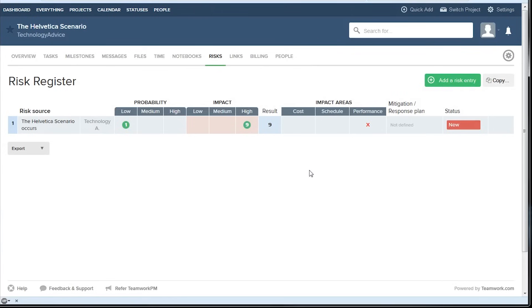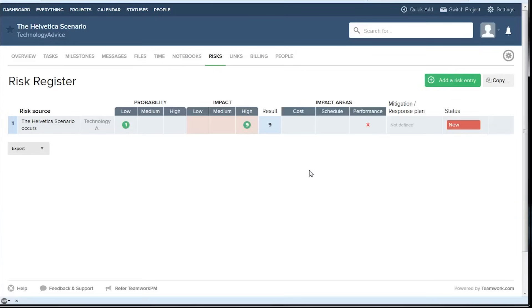There's also a risk register which allows people to enter any problems that they might be worried about or just potential obstacles to look out for and set some parameters such as how likely you think these are to occur and what the impact would be if it did occur.